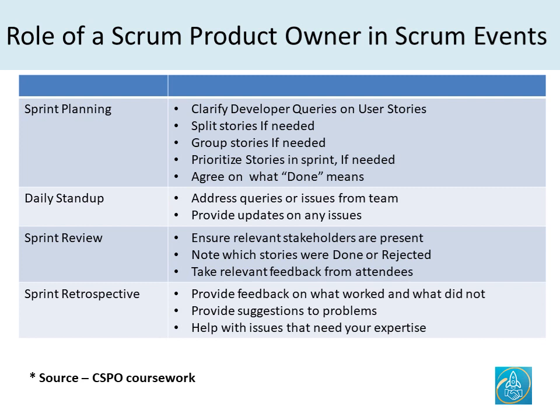During the sprint review, as a product owner, you need to make sure that the relevant stakeholders are present. It could be the development team members or the stakeholders from the business user side. And then you need to take a note of what was done during a sprint and what was not done. And then finally take the relevant feedback as necessary to improve to focus on the next sprint.